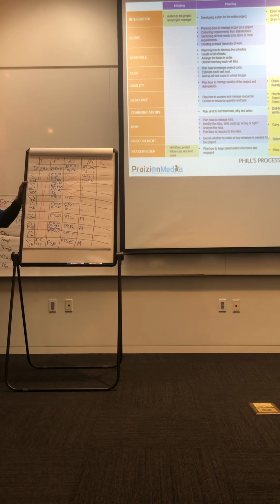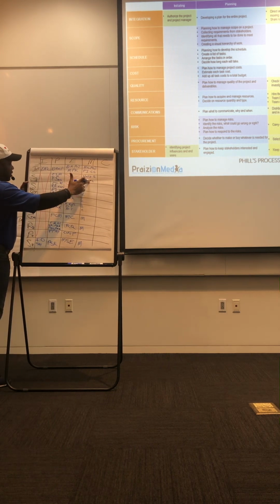You know what gold plating is? When a team member gets a bright idea to do extra that the customer didn't ask for. That ever happened to you? Team member adding extra, why are you doing this? Oh, I just want to look good. They want to look good, but they end up gold plating and that leads to scope creep. So we're trying to prevent that in this process.